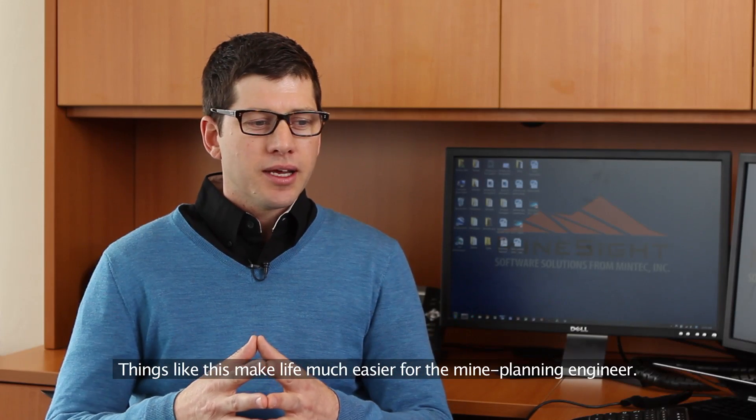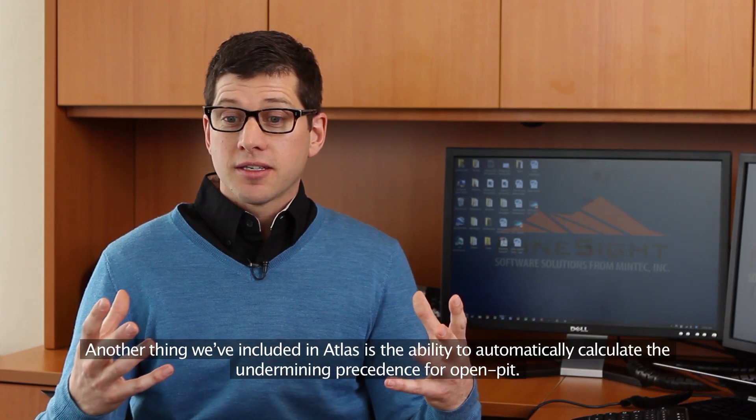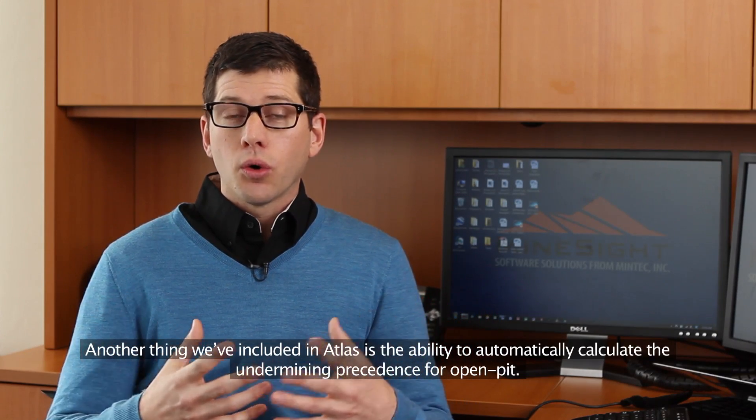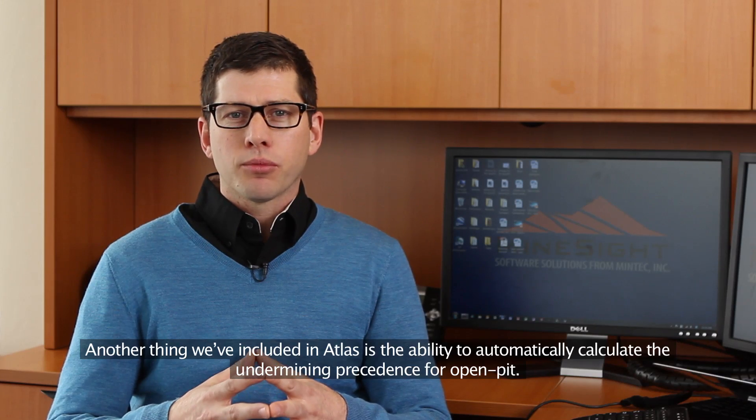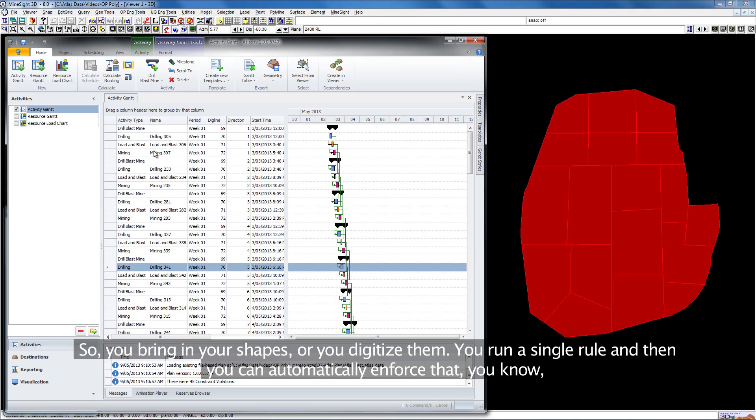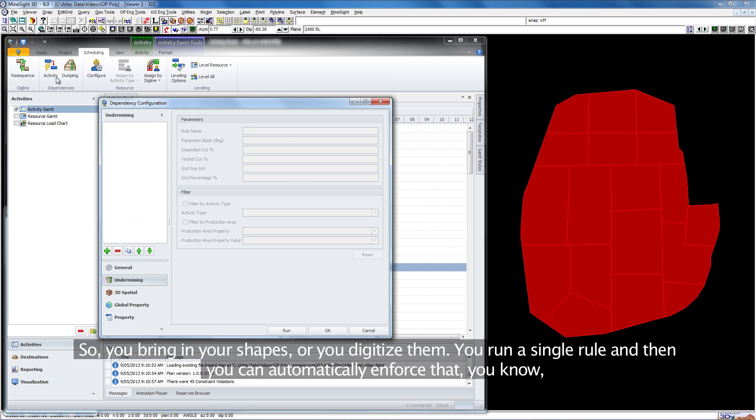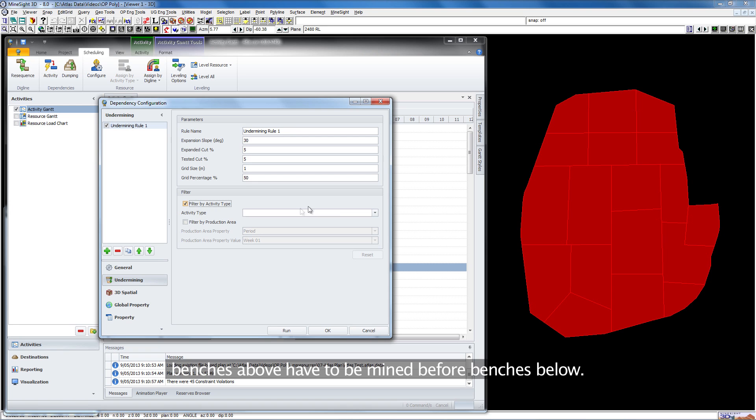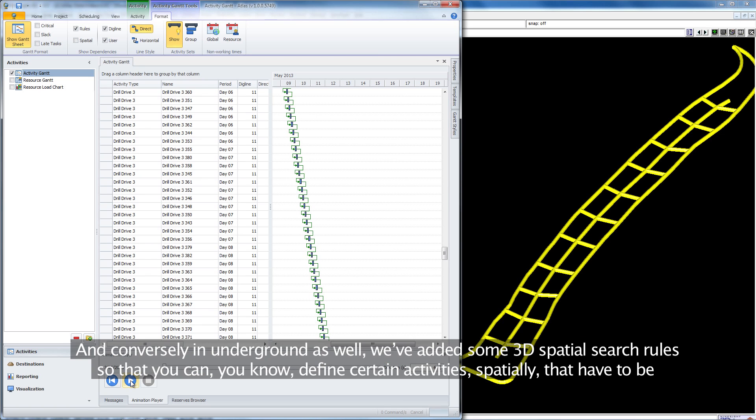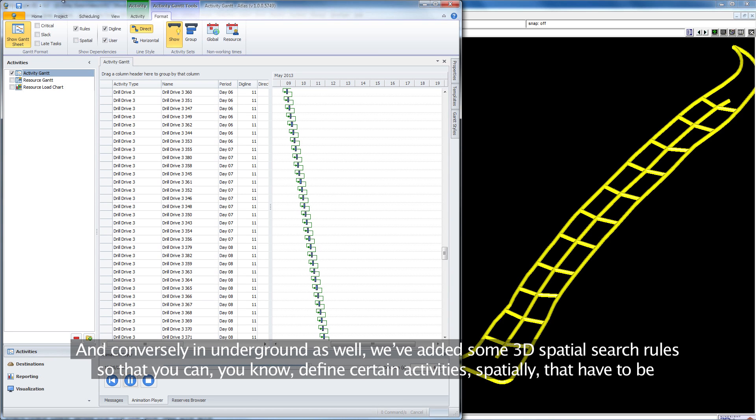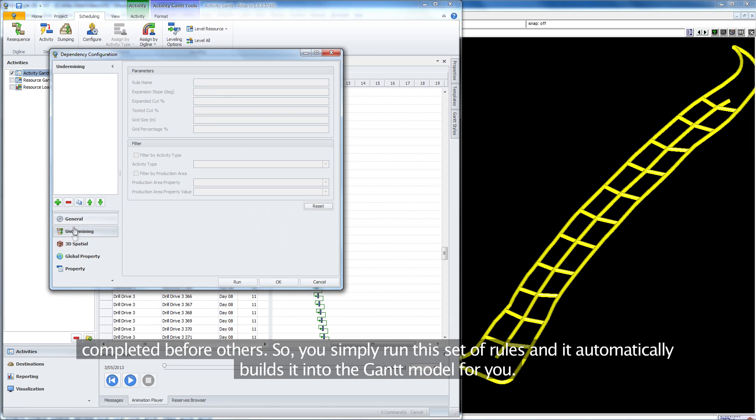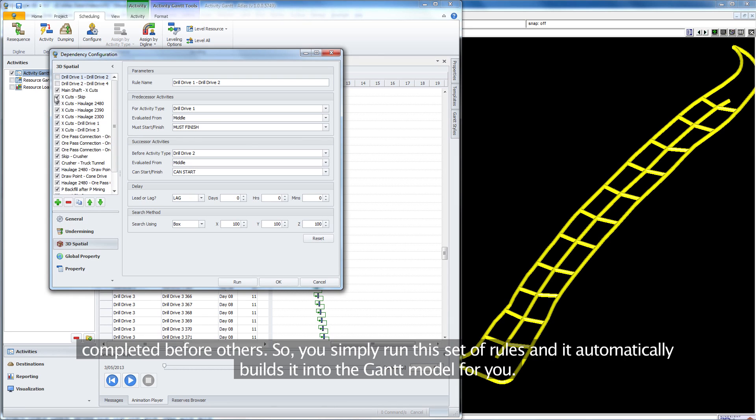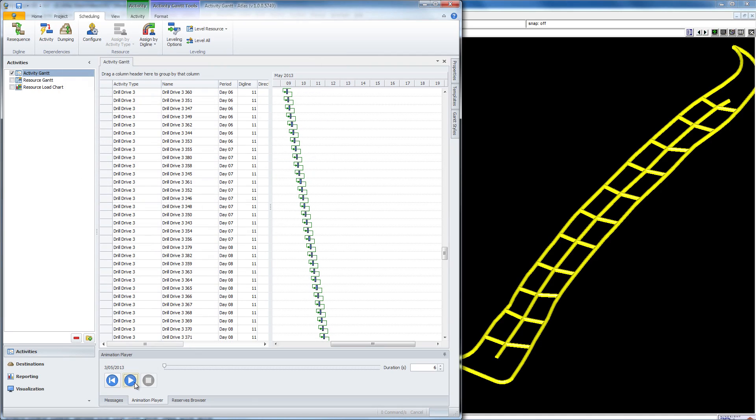We've included in Atlas the ability to automatically calculate the undermining precedents for open pit. You bring in your shapes or digitize them, run a single rule, and you can automatically enforce that benches above have to be mined before benches below. Conversely, in underground we've added some 3D spatial search rules so you can define certain activities spatially that have to be completed before others. You simply run this set of rules and it automatically builds it into the Gantt model.